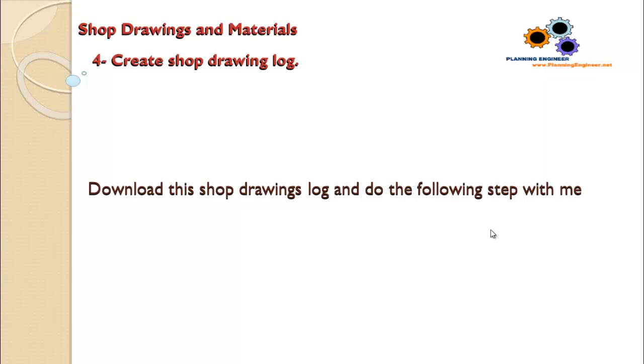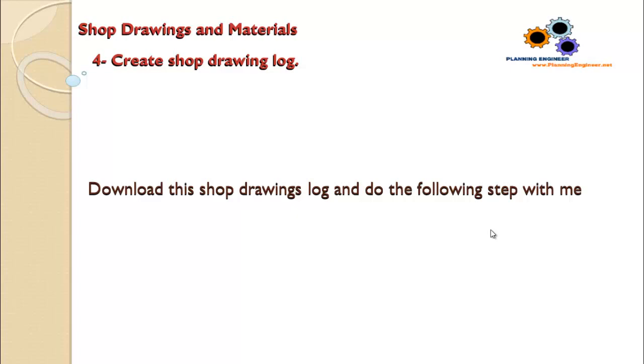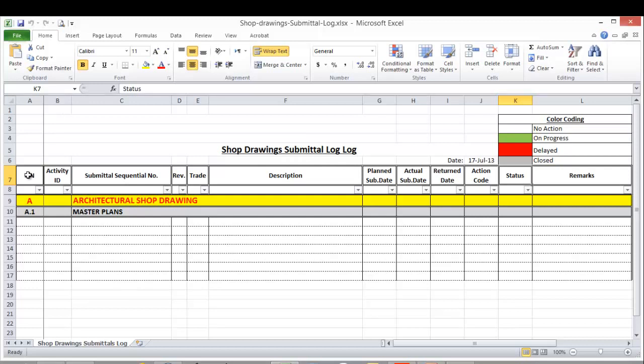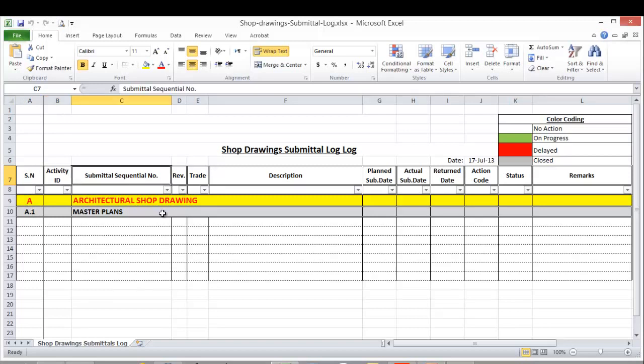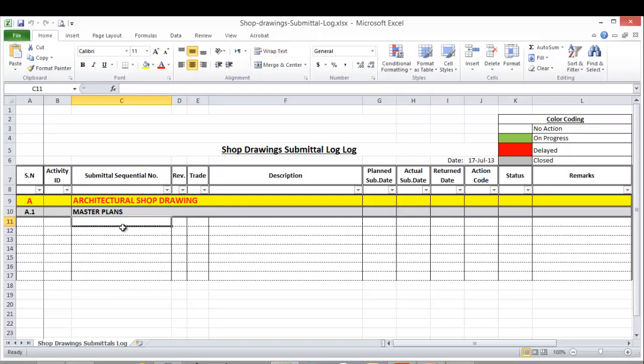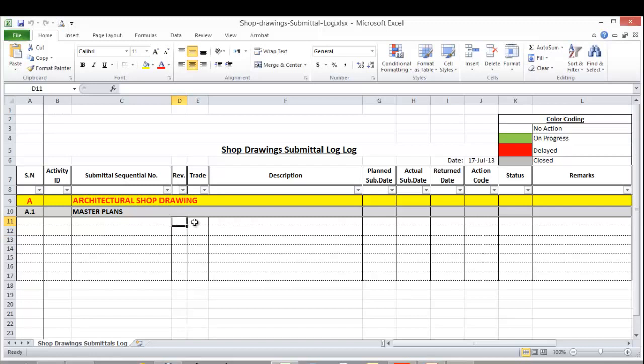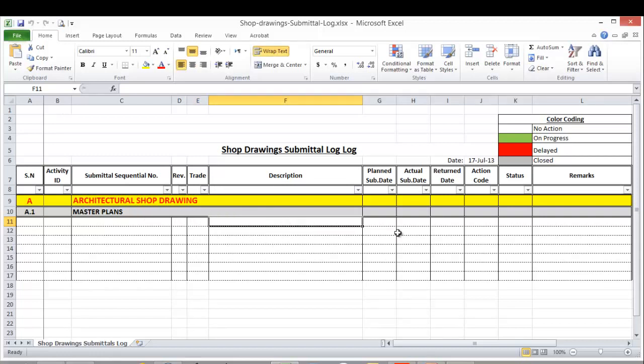This is our sample shop drawing submittal log. We have several columns here: serial number, activity ID, and submittal sequence number. When you're submitting anything to the client or consultant, there's a reference number or sequential number that you should put here for monitoring. This revision tells you the revision of the document. The trade here - architectural, mechanical, electrical - is for filtering purposes. Then the description of the shop drawing.